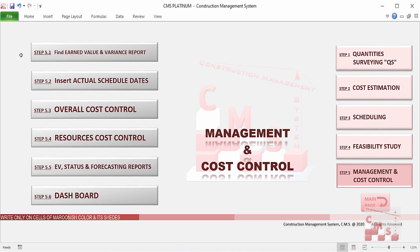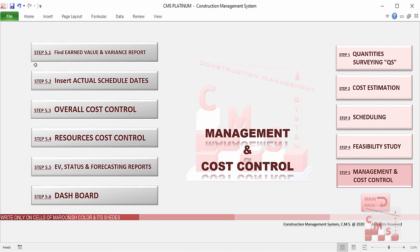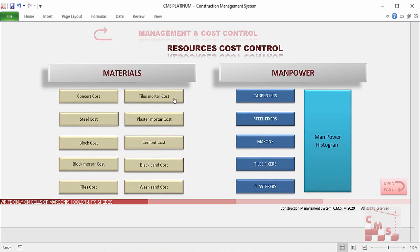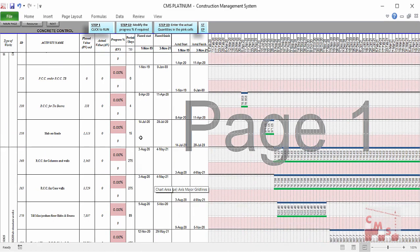CMS will calculate the earned value according to actual progress on site and give a variance report comparing planned and actual progress. CMS will also make an overall cost control for the project and show the financial status — whether over budget or within budget. The same is done for project resources, both materials and manpower. CMS will monitor and control consumption of materials like concrete, steel, block mortars, tiles, plaster mortar, cement, and sand, and also monitor manpower against the planned baseline.